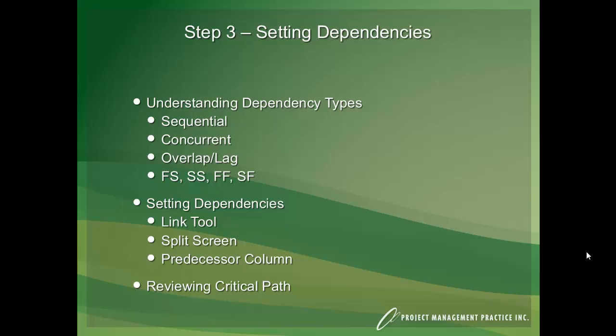Or maybe at the end of task 1, you have to wait 5 days before you start task 2. And you can use the lag field and put in positive or negative values to accomplish that. The terminology that project uses is finish to start or FS, so when you finish task 1, start task 2, and that's sequential.